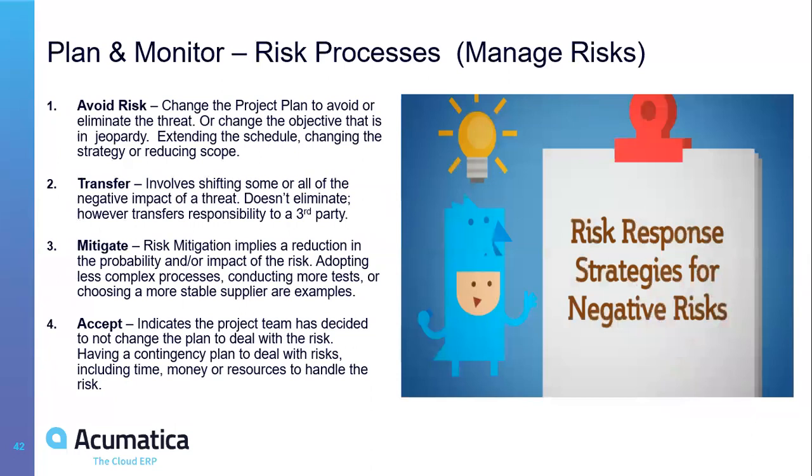So to manage risk, you have four options when it's really coming. Number one is try to avoid it. If I know the room is important for me, then I make sure it's there, right? So the risk cannot happen anymore. So that's the preferred solution.